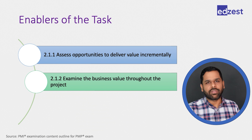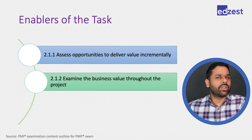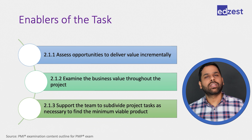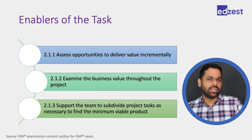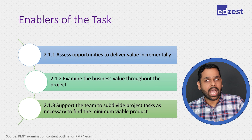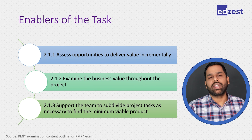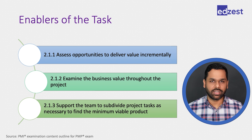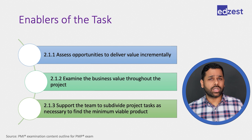The second enabler is examining the business value throughout the project — checking whether we are moving in the right direction and actually delivering value. The third enabler is to support the team so they can subdivide project tasks, create MVPs, create prototypes, and understand what kind of value they can deliver with minimum effort. With minimum effort, they should confirm they are moving in the right direction.